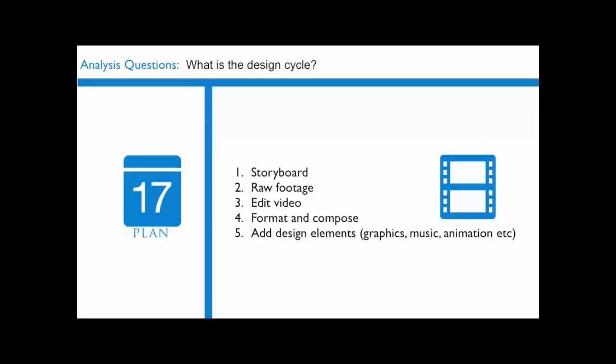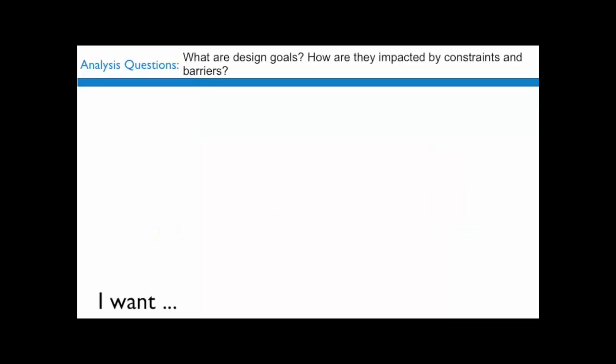In this regard, the design plan is critical because it helps establish a framework for how the work is going to be achieved. My advice here is to do what's referred to as reverse planning. Start with the last thing that you need to complete and work your way backwards. This provides an opportunity to think deeply about the design problem and articulate ways in which it can be solved.